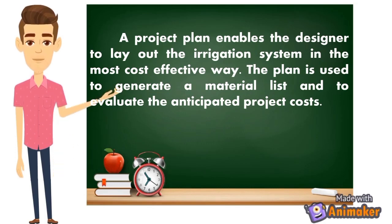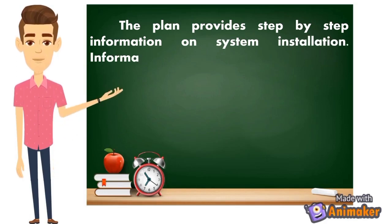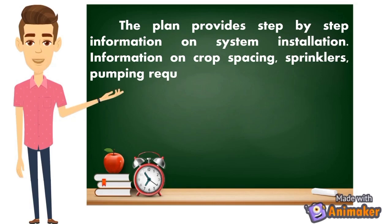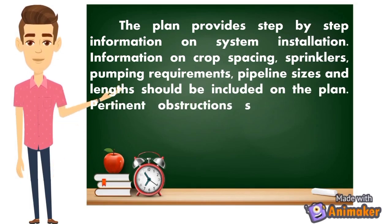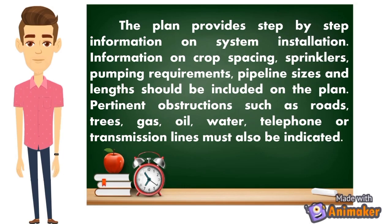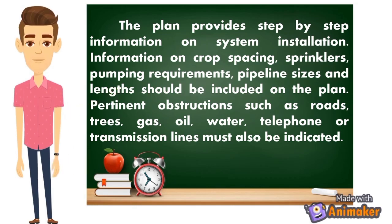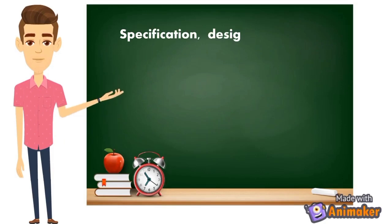The plan provides step-by-step information on system installation. Information on the crop spacing, sprinklers, pumping requirements, pipeline size and lengths should be included on the plan. Pertinent obstructions such as roads, trees, gas, oil, water, telephone, or transmission lines must also be indicated. So sa pagpaplano, step by step siya — kailangan specific yung mga information na ilalagay mo sa plano mo.